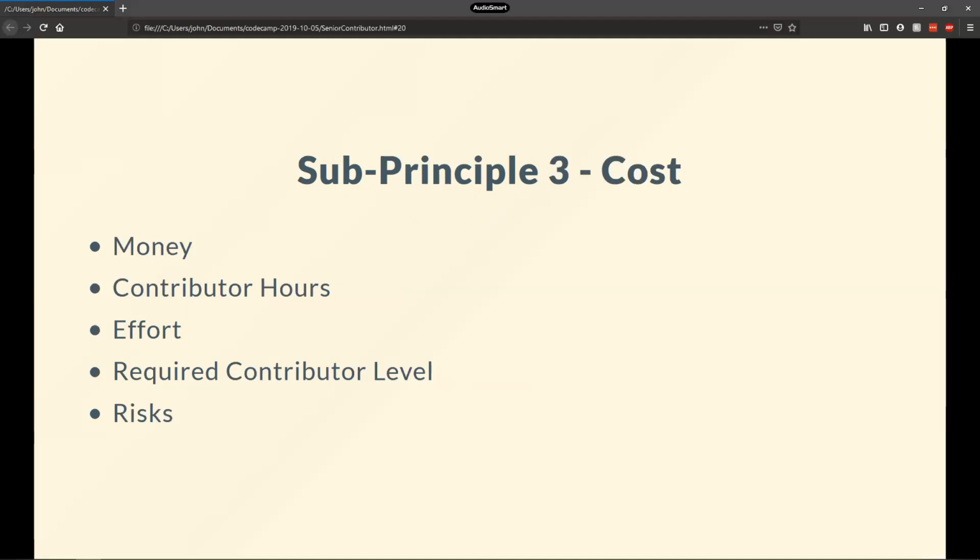If you're making it purely based on the numbers, you say, what's the expected amount that I would earn, and then what's the chance that I would lose it? You factor those in, and those risks basically become the expected earnings, including the risk. Basically the risk allows you to make a decision. So if the maximum upside on this is that the program would be, I don't know, 25% faster, which might be good, but the downside might be that it might take me a month to do it, well, maybe it's not worth it, right? So you might rather have it slow.